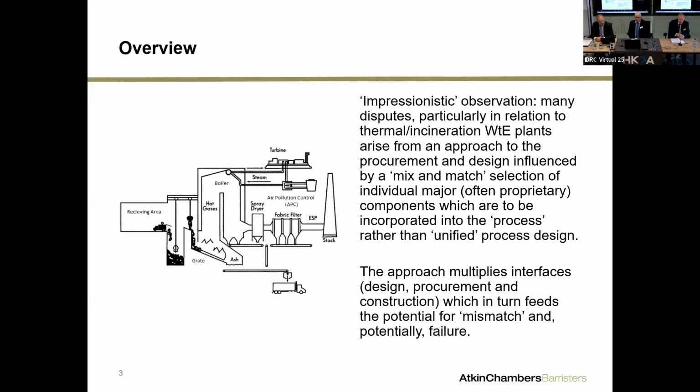Based on my experience of looking at domestic and international disputes in waste to energy, particularly in incineration plants, thermal plants, as opposed to digestion plants, many of the disputes arise from a particular approach to design and procurement that's been adopted over the years, which is what I might call, in slightly rude parlance, a mix and match. Developers and contractors look at the construction of what is actually a rather complex process by reference to picking particular components, often proprietary, and linking them together to form a particular overall process, rather than thinking about the process as a unified engineering process overall.